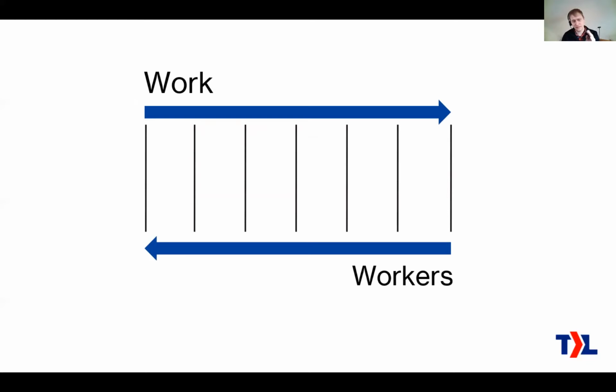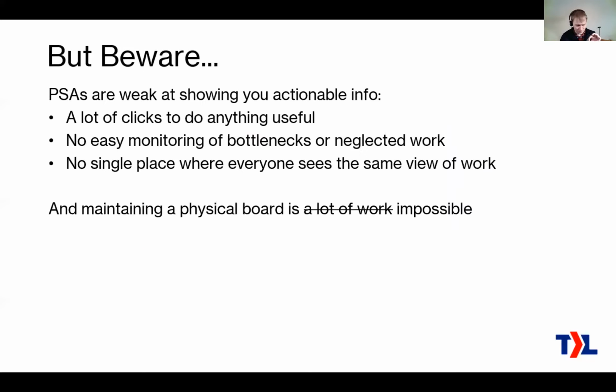So again, just a little reminder, if you remember one thing from today: work goes left to right on the board. As it gets closer to being completed, workers focus going right to left. And that keeps them focused on the work that's already closest to being complete so that they finish work before they start new work.